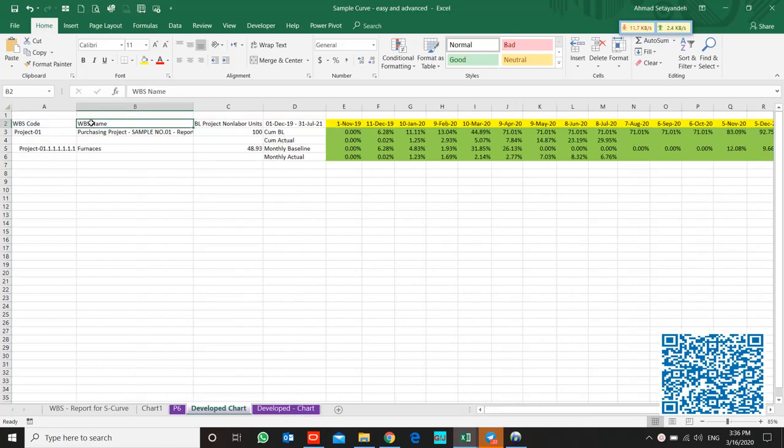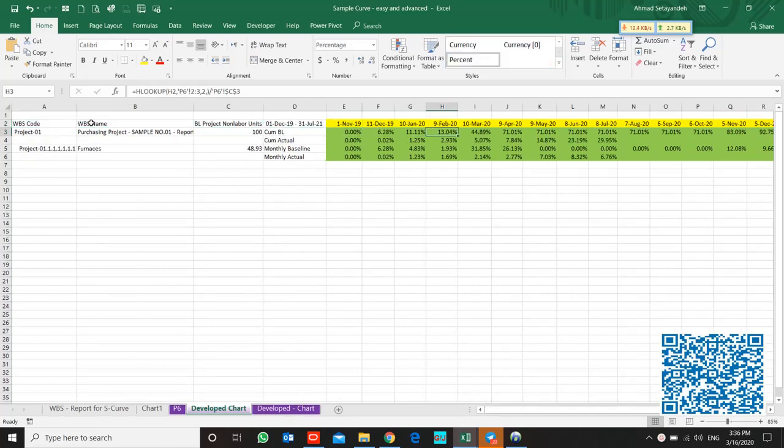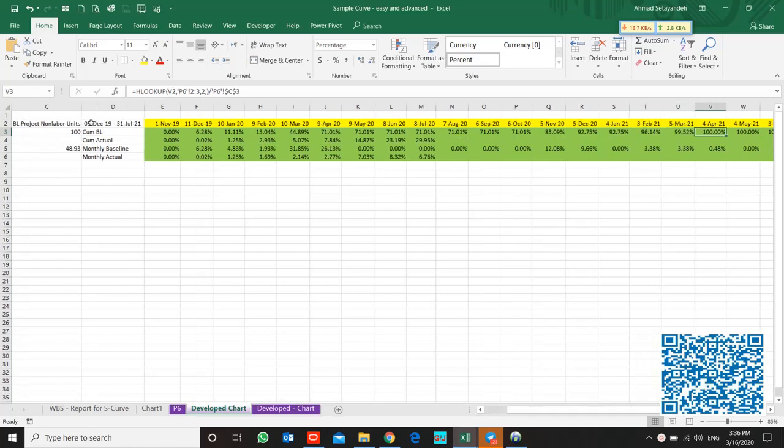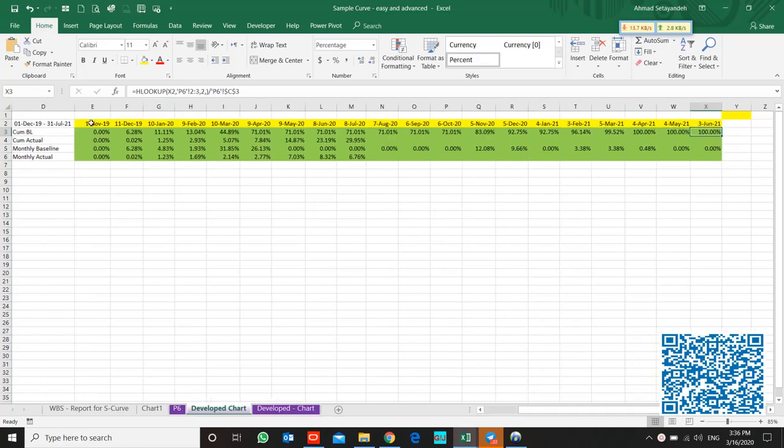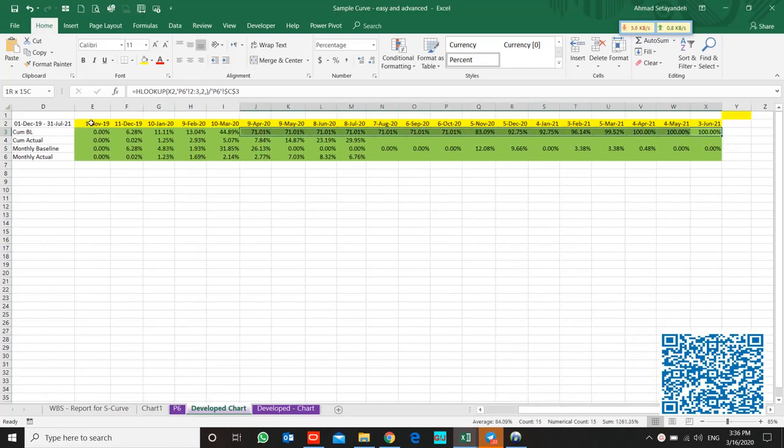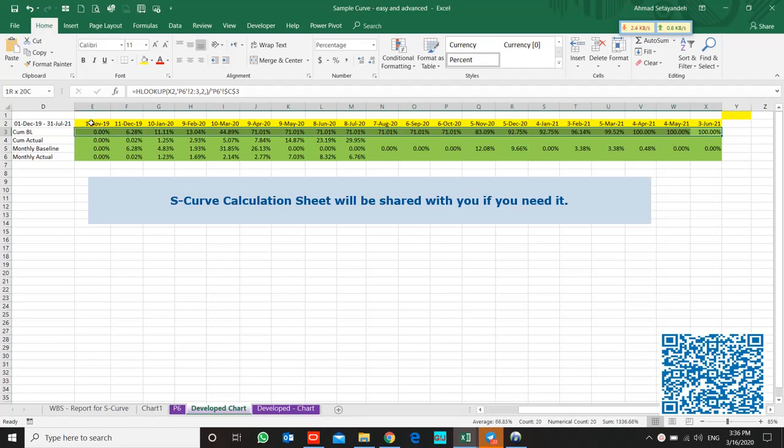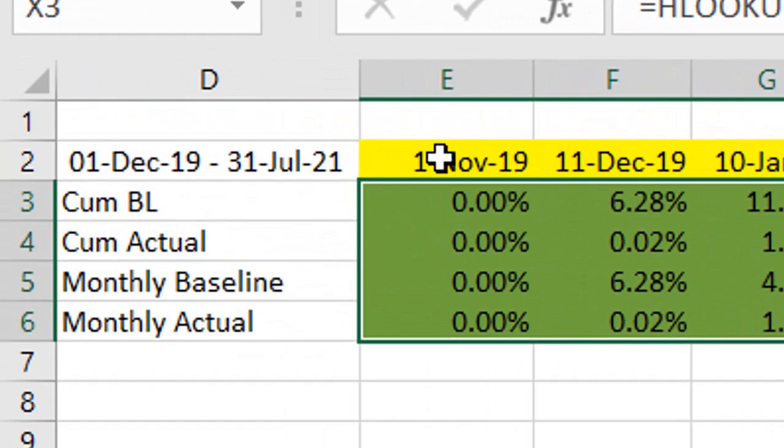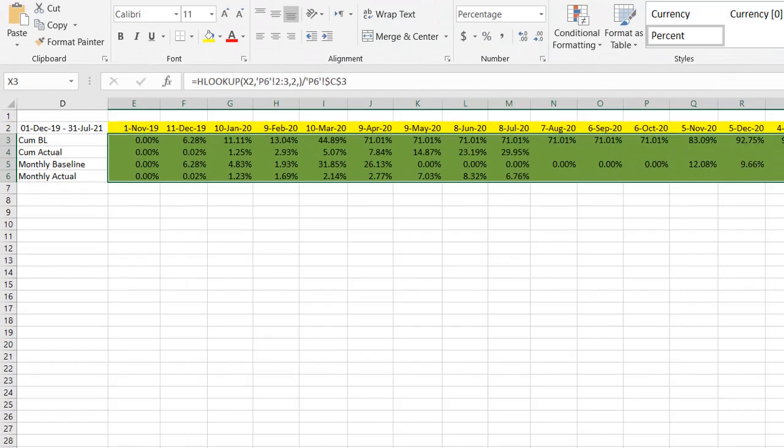This is the calculation sheet of the S-curve and you can easily provide it. It's not complex. This S-curve compares baseline and actual, and this is the chart.